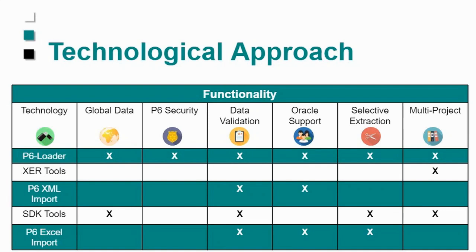And we actually had this happen to one of our clients where someone decided they would edit an XER and change a code from being an EPS level code to being a global level code. Unfortunately, they spelt the word global incorrectly. They just inverted two of the letters. And it imported, but then as soon as anybody tried to log into P6 and it tried to read the activity code dictionary, it came across this value it didn't know what to do with, and it just shut down. And it took us a couple of days to figure out what had happened and how to fix it.